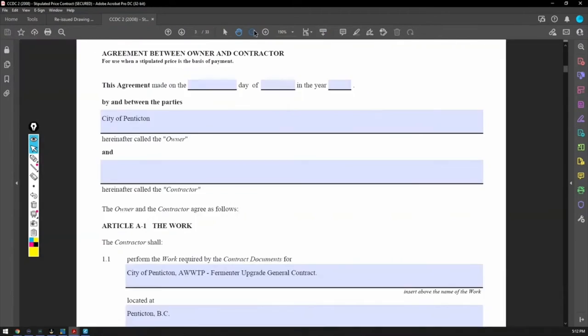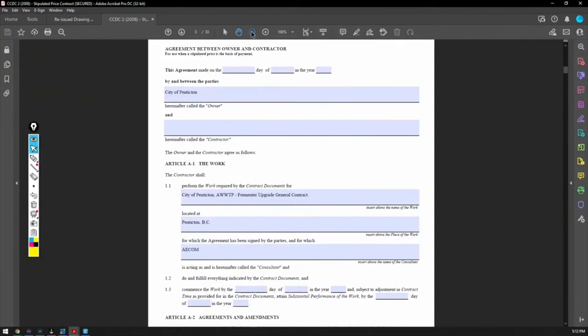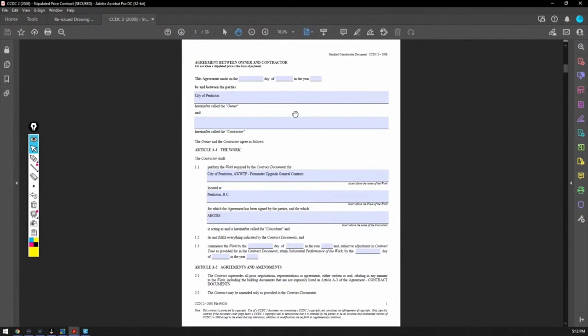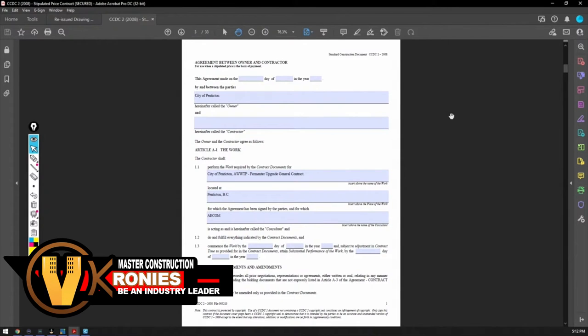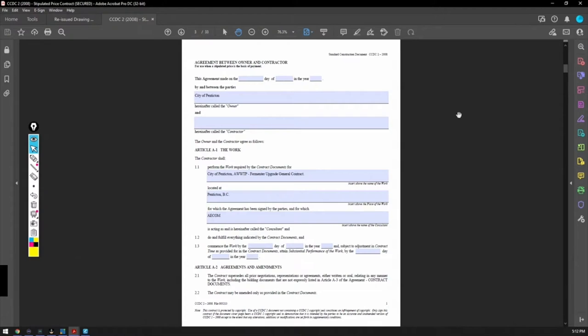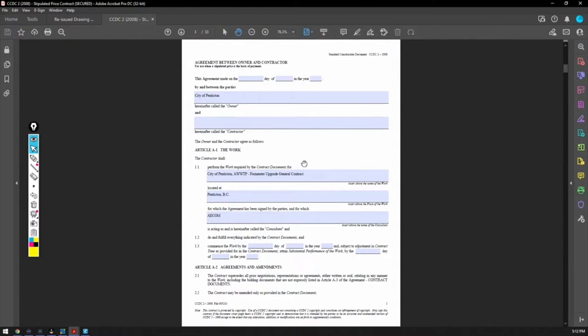Here's the contract. This is the most standard agreement between a general contractor and an owner. As a subcontractor, you're going to have a different contract. You're going to have what's called a 4B. It's a different contract.